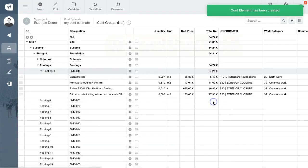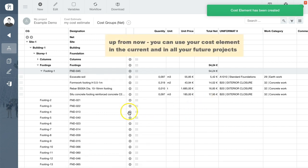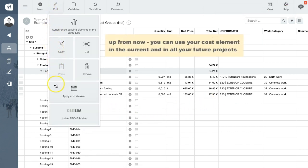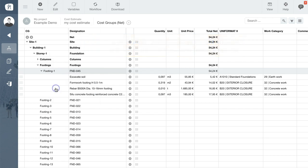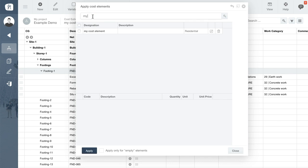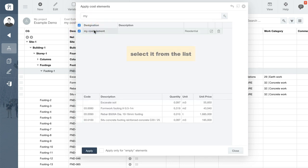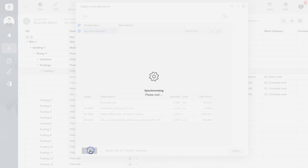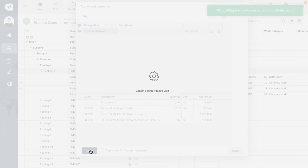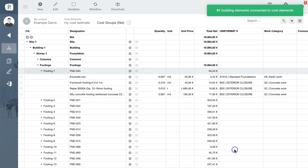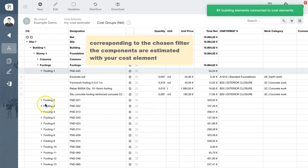Let's try it out right now and apply our new cost element to the current project. Open the Edit menu at the top of the page and select Apply cost element. Selecting the new cost element then opens a panel displaying the work items we just assigned to this cost element. Click Apply and within seconds the work items within the cost element are assigned to all building components that correspond to the chosen filter.